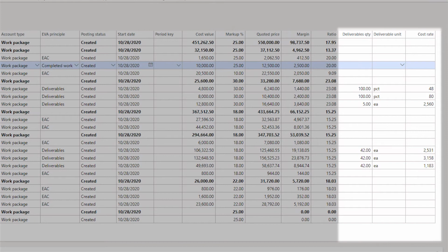So a quantity budget can really represent anything, a percentage of completion, a number of units that you have completed up until a certain point, or even square meters, miles, or cubic meters, any kind of quantity that you can measure against the project, and we can subsequently hold up against your budget consumption to do productivity calculations.